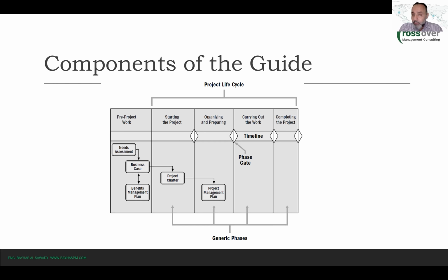And that's why we also call those phase gates kill points, because projects can be killed here. If the project cannot prove that it's still necessary, that it's still going in the right direction, that it's still going to bring the benefits that we actually documented in the benefits management plan, then better we kill the project.